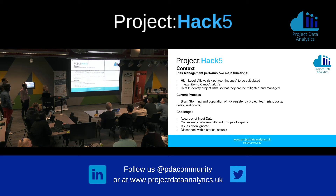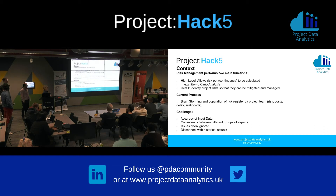The current process that has been pretty much what's happened on every project I've worked on is: we have a risk management workshop, everybody goes into a room. We all have a think about what are the risks that might come up on this project, and then we say, I think there's a 10% chance of that one happening, and if it does happen, it might cost 10,000 pounds. And then we log all of those.